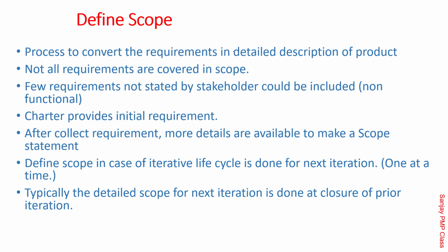So define scope, and that's where scope is. It's converting the requirement into a detailed description of the product. Not all the requirements are covered there. Few requirements are not stated by the stakeholder, which are non-functional, and those are also included. The charter has very broad level requirements, so they are not really detailed. After collect requirements, more details are available to make a scope statement.